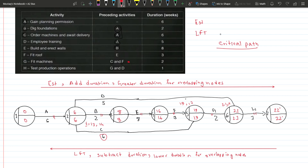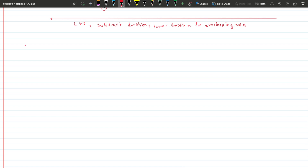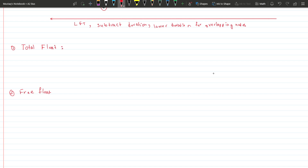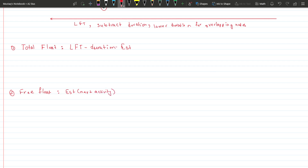If we delay C or D the project still ends after twenty-two weeks. That is why identifying the critical path is important for the business. After completing the diagram, there are two more things to calculate if the question asks: total float and free float. The formula for total float is: LFT minus duration minus EST. The formula for free float is: EST of the next activity minus duration minus the EST of the current activity.